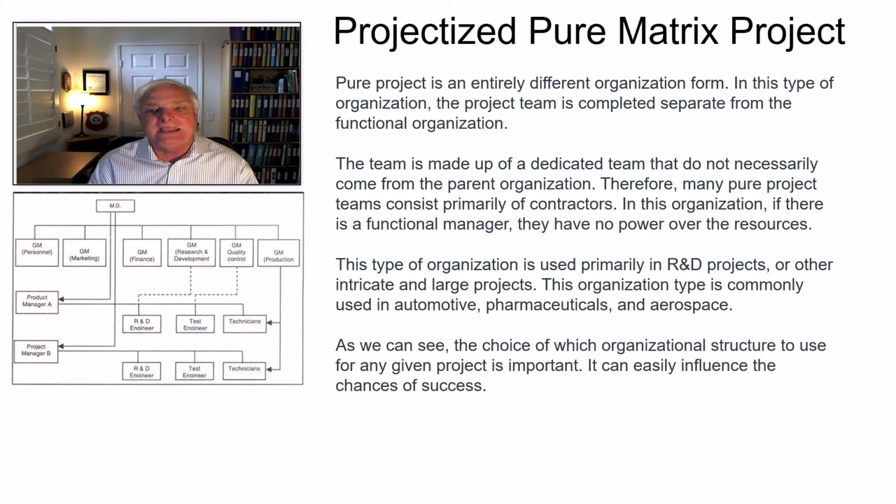I have a dedicated team that is basically assigned from the parent company. I will not release any of these people until my jobs are completed. So therefore, I don't have to worry about constraints as far as other teams needing my people and pulling them away. There's a completely clear line of autonomy, as you can see within the diagram that we've provided for you over here.